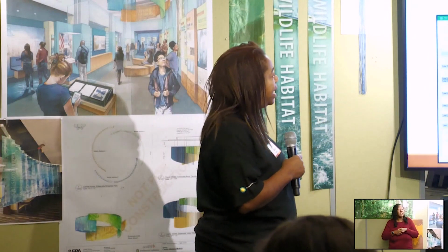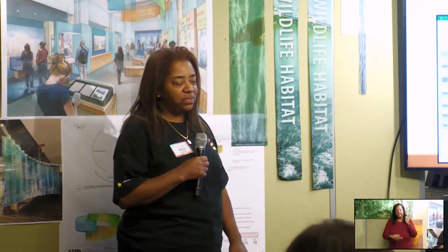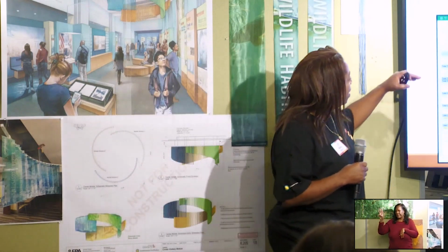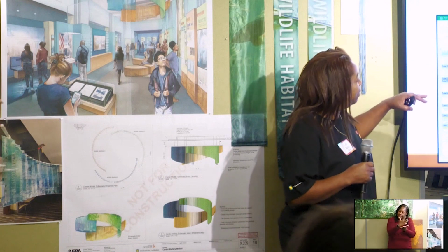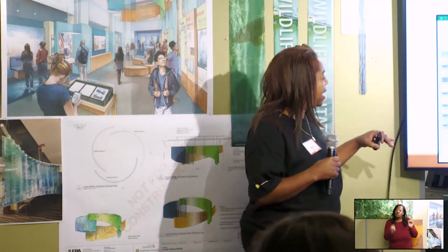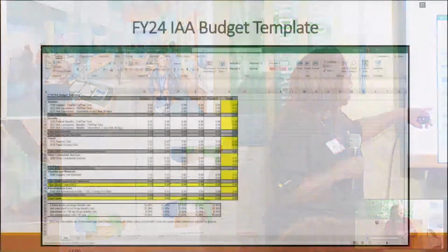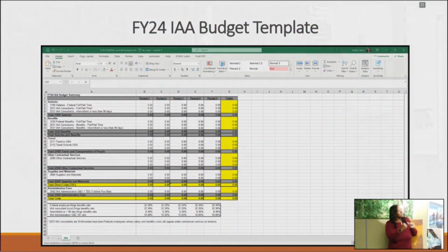This is a sample IAA budget that comes right off of our Office of Sponsored Projects website. I'm not sure if you can see this, but there are sections for salaries and benefits, any travel associated with the IAA, contractual services that we may need, materials and supplies, and down below there's an administrative fee of 10%, which automatically calculates based on these fields being populated. That informs OSP of the cost of the IAA, and that cost is reflected on the 7600A and B forms.